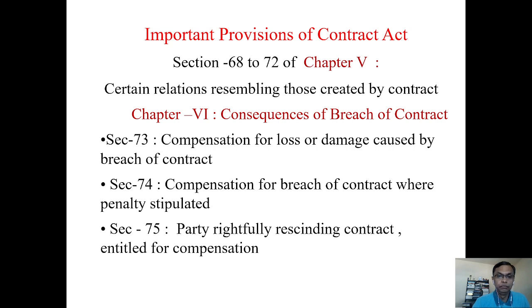So generally, in case of delays by the project contractors, the owners will claim the LDs as stipulated as a remedy, because the LDs are mostly stipulated in the contract. In case of owner-caused delays, the contractor will claim compensation because nothing is specified mostly in contracts. They claim compensation for breach of contract under the Contract Act.